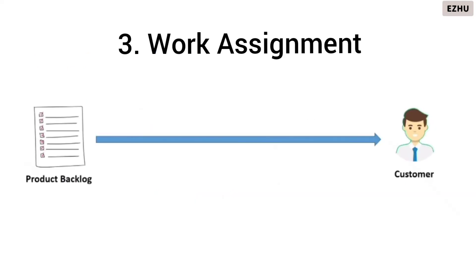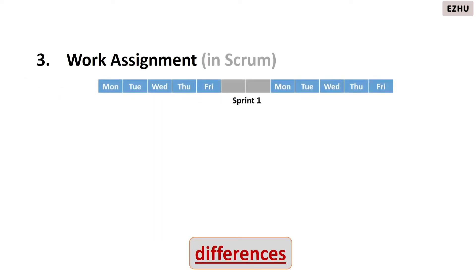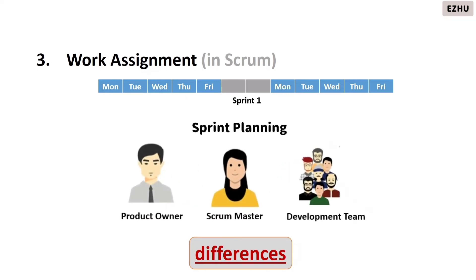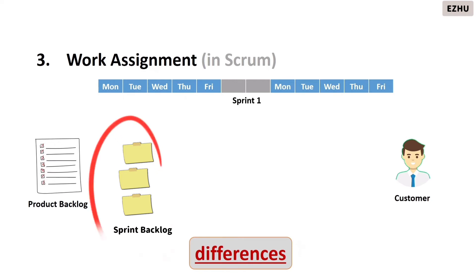Let us now see how work assignment is done. Both scrum and kanban use the pull technique but the implementations are completely different. Work is executed in scrum in the form of sprints — a two-week period by which an identified set of features will be incrementally developed and delivered. The scrum master runs a sprint planning meeting attended by the product owner and the development team. All user requirements, features, and user stories are captured in the product backlog. The product owner then prioritizes the list of items from the product backlog to be executed in the sprint, and only those prioritized items will be executed in that sprint.